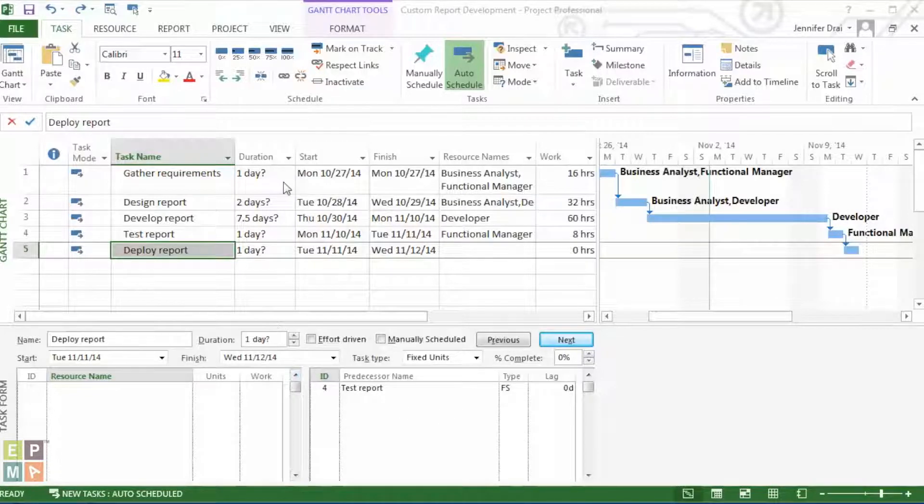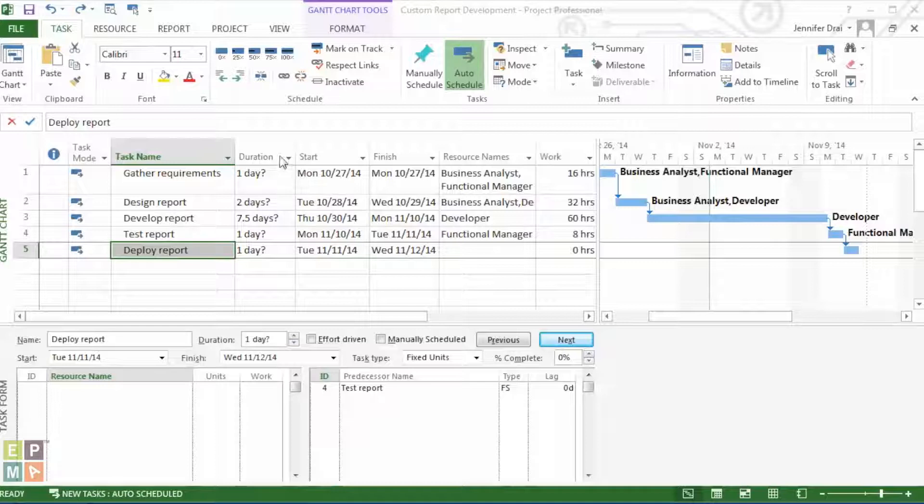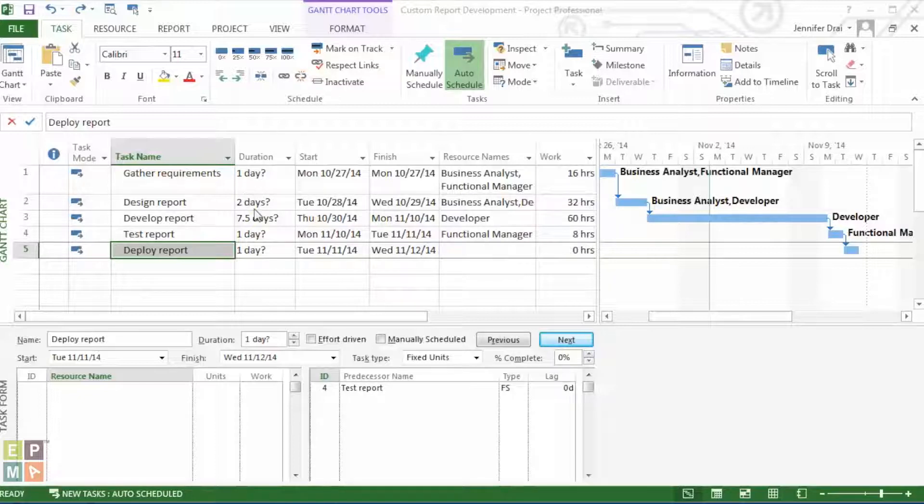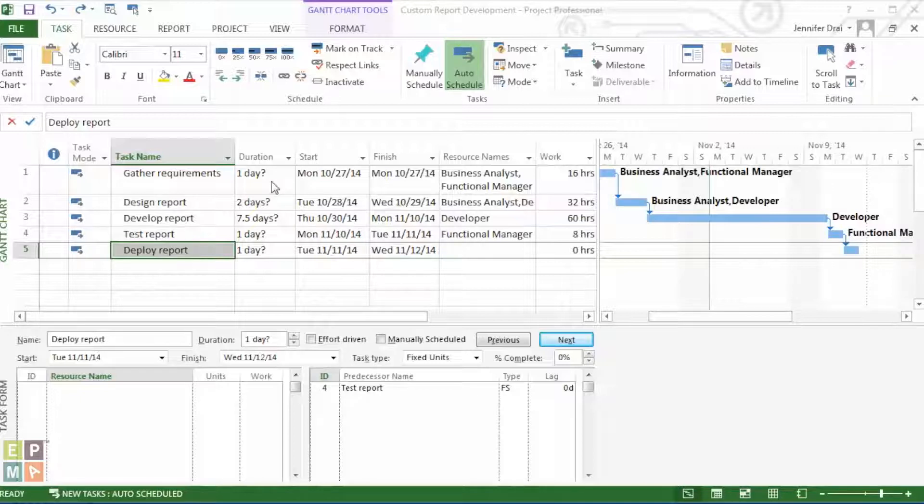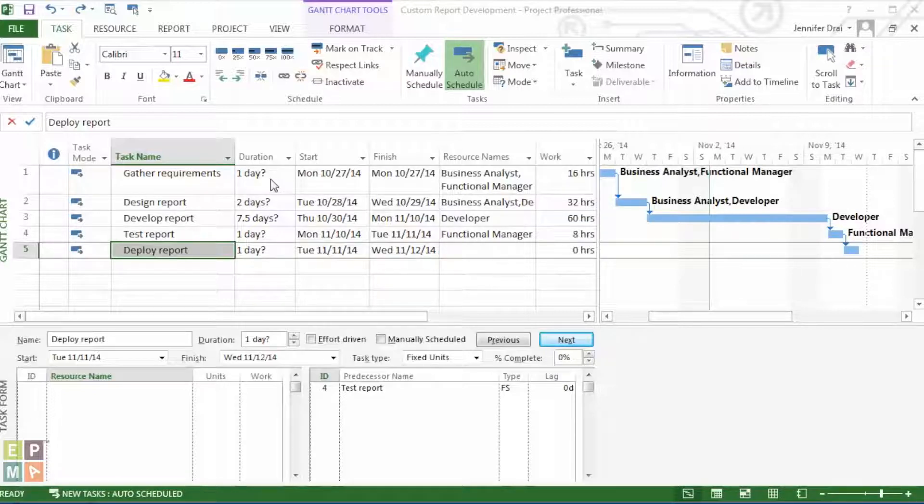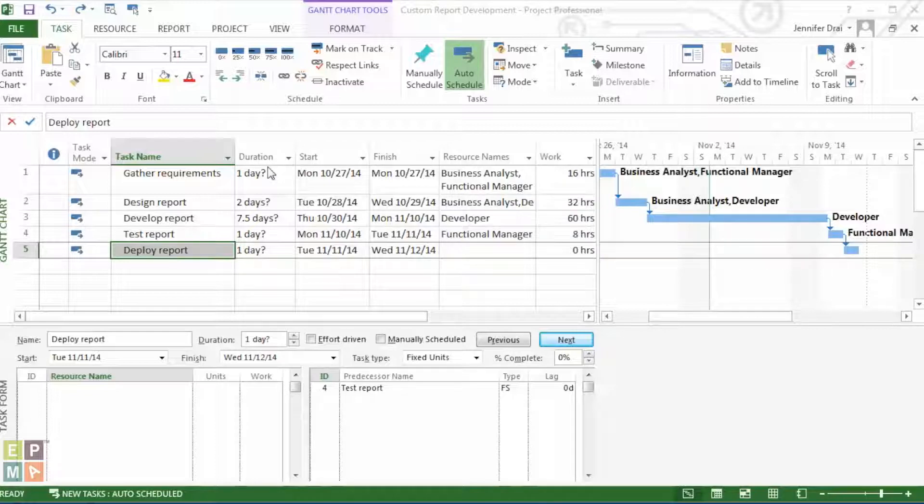Now when it does that, notice how it shows a question mark right next to the estimated duration you see right here in the duration column. This question mark is there because it's intended to notify the user that a duration has been estimated. The way Microsoft Project typically estimates or calculates that is by following the relationship between the work duration and assignment units through the equation where duration is equivalent to work divided by the assignment units.